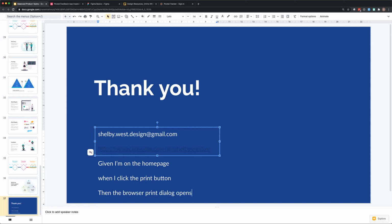As a team, we're going to decide what kind of level we're going to go through, or what pointing structure we're going to have. Our teams typically do a 1, 2, 3 t-shirt size for complexity type of pointing. So everybody on the team would look at this. We would look at the design for it. We'd take into account how many browsers we support with our application. And you'd say, this is something that is a small amount of complexity, meaning I got this, I know exactly how to do it, I've done it before, it's going to be super easy.